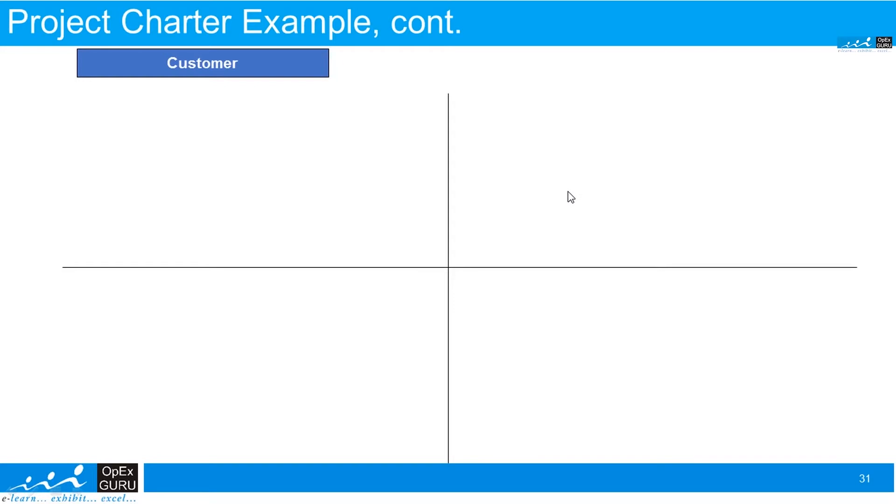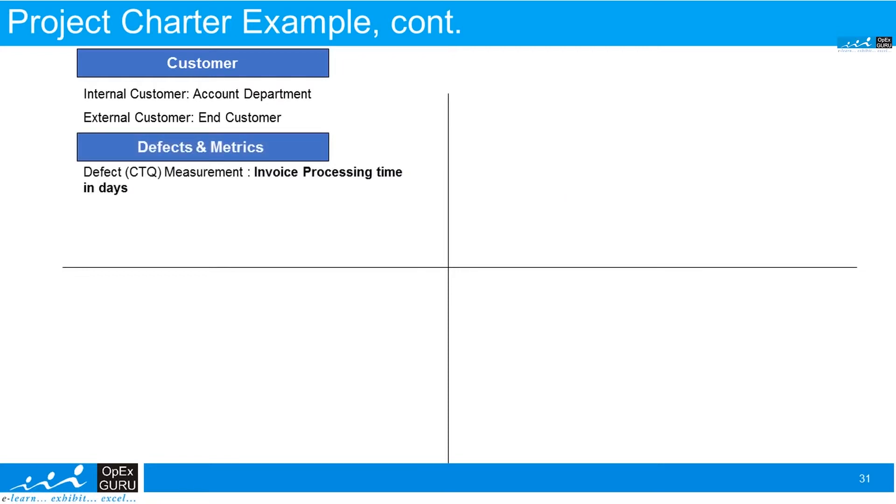Let us understand other components of the project charter. Customer: who is the customer? Accounts department. Who is external customer? End customer. What is the defect matrix, or we call it CTQ, critical to quality parameter on which we are doing the project? Here the CTQ or defect measurement is invoice processing time in days. What is the definition of a defect? If any invoice which has taken more than two days to process.